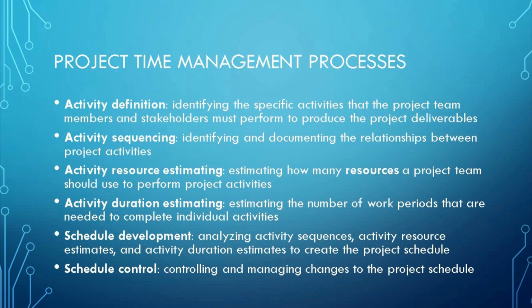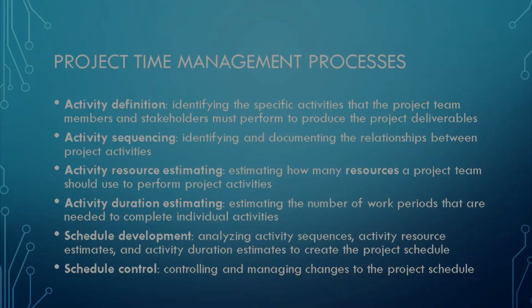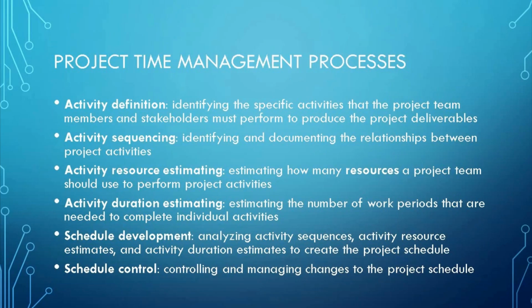This step is where the hard work of calculating how long each task is going to take happens. During this process, you'll work out how long it's going to take to do each activity, using the resources that you have identified. Don't forget to take into account resource availability and holidays with your activity durations. Just because a task only takes 8 hours doesn't mean it will be finished by the morning.